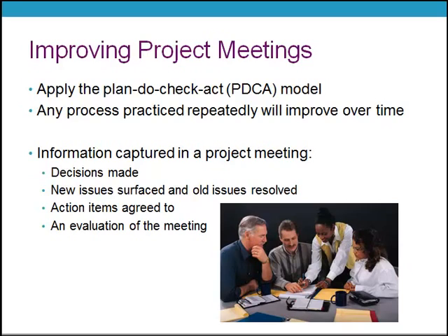You also may want to conduct an evaluation of the meeting with good points and elements that might be changed by using a plus-delta template. It might look like, well, each person provides at least one good thing, that's the plus, and each person provides one thing to overcome or change, that's the delta. Debbie might say, I really liked that so many of us communicated openly on the potential changes to the project schedule. As an area for improvement, though, I think it could be helpful if we rotated the meeting location so that we could take turns with convenience.